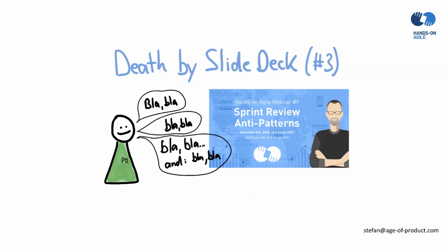Or another situation, if you're working with several teams on the product, create some sort of science fair. Have small booths where the teams are located and the stakeholders can walk around and have a look at the different issues and the different parts of the product increment the teams built. So no death by PowerPoint. It's annoying and it's not contributing to the reputation of this important event.